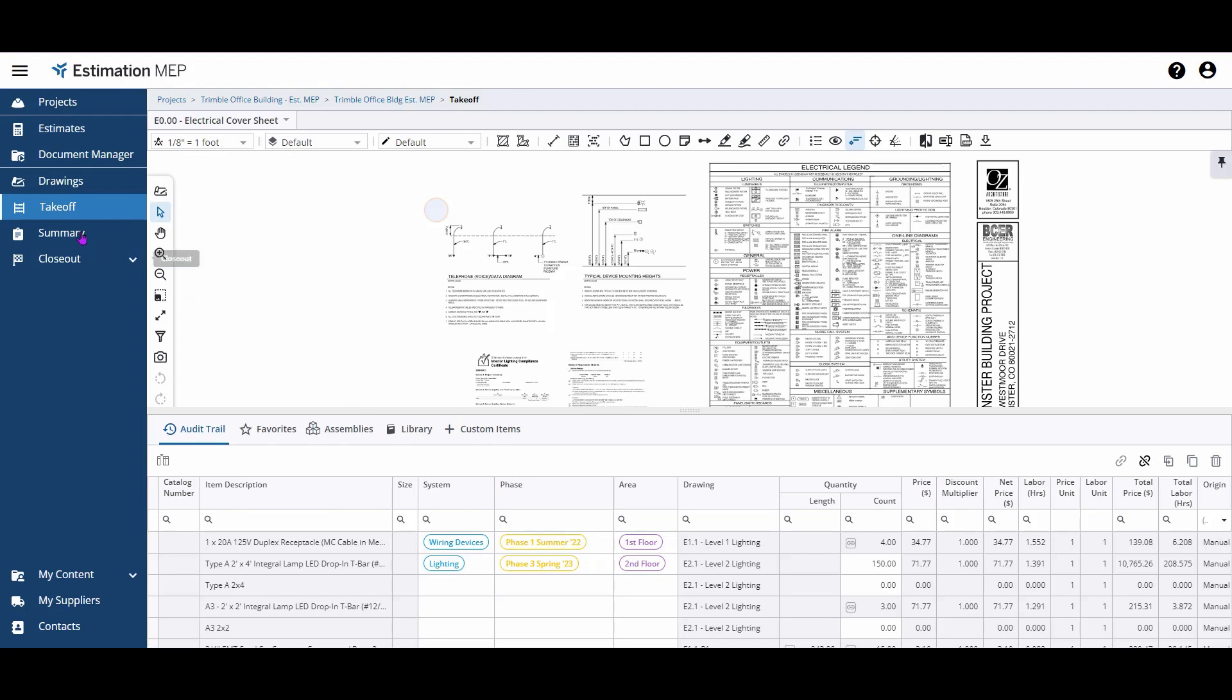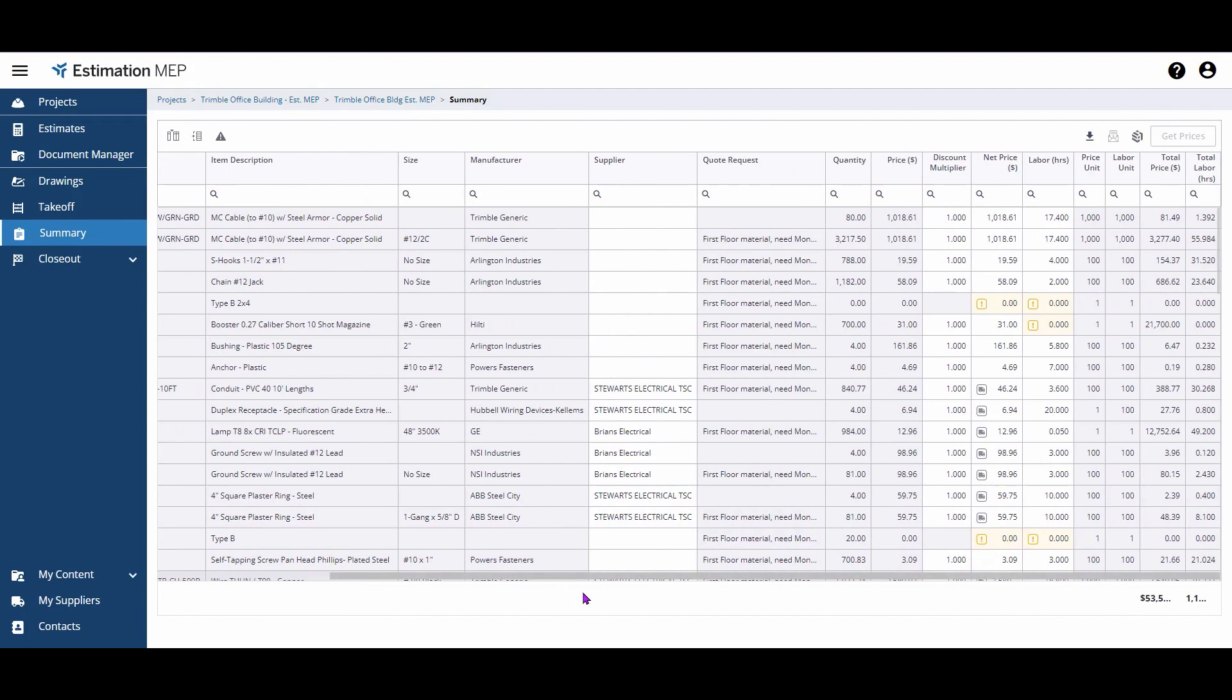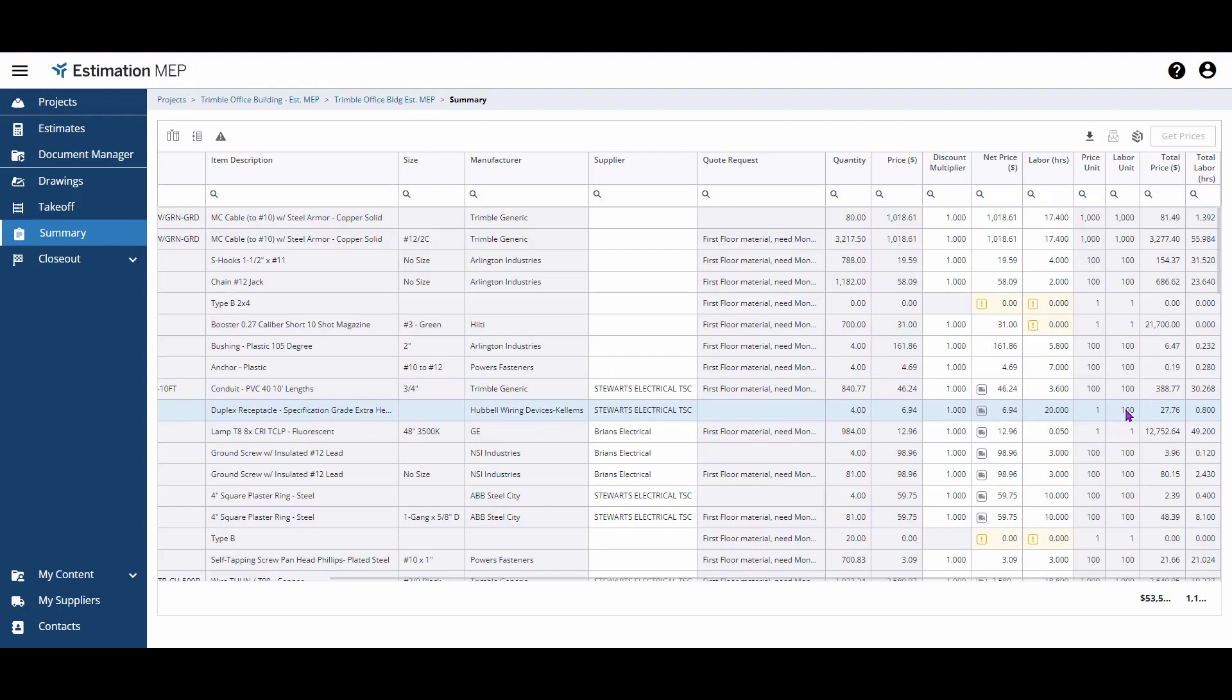To start, we'll go to your summary screen. When viewing your summary screen, you can see the labor hours applied to individual items as well as the associated labor unit. All of these white cells are editable.